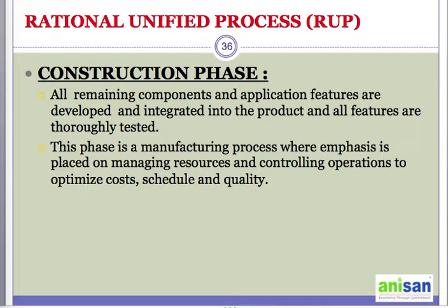When we decide the operating model after the architectural diagram is done, that is, when the architectural diagram or the prototype is accepted by the stakeholders, they will know how the solution will be implemented and the number of resources required to put it into operations. Along with that, we also need to identify the team members who will perform a particular role at a particular time.